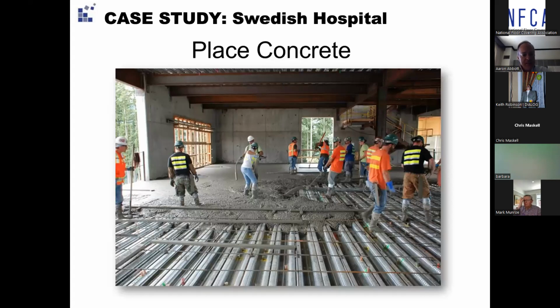I'm not the expert on concrete. There are probably some listening to this who are. Let me just say, one key would be 10 degrees Celsius up here in Canada. That's your parent concrete's temperature before you can start placing SLU, unless the manufacturer says differently. Yeah, the concrete manufacturer needs to be a part of this conversation. They need to help us with how quickly we can place the second layer on top of the bull floated concrete, and how long it takes to cure until it's structurally sound enough to do that work.